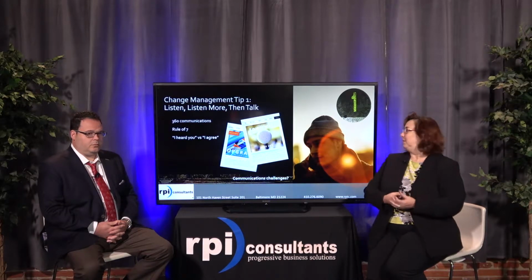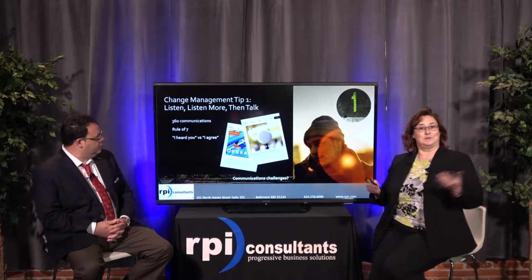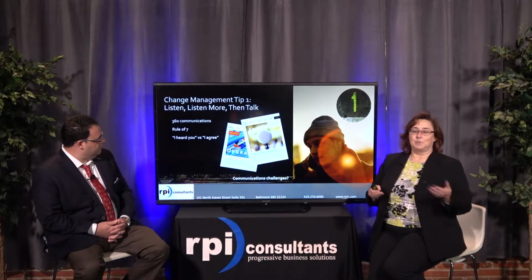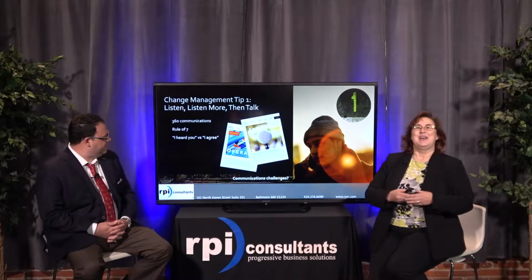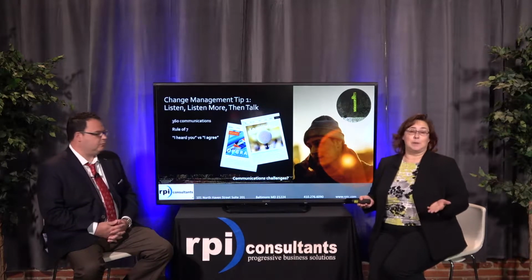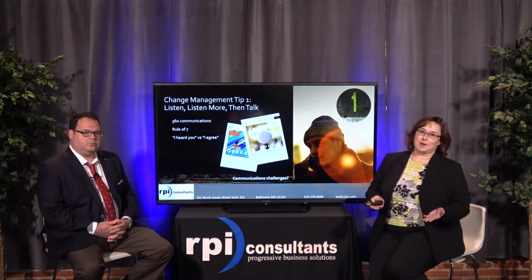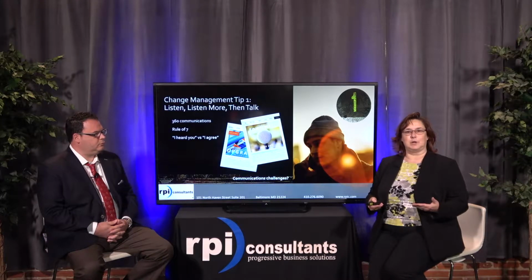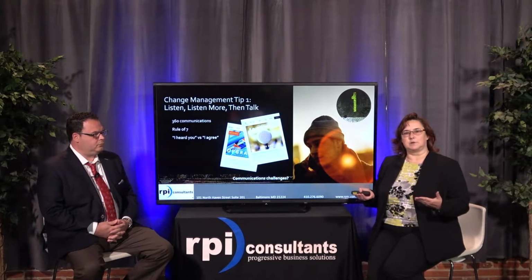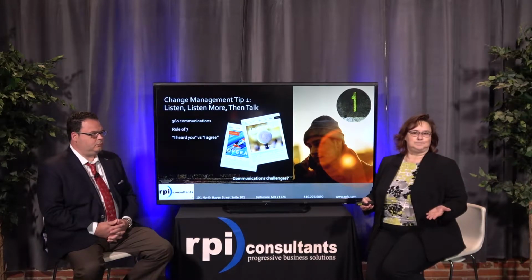If you look there in the middle of the screen, we've got an example of one of the forms of communication we're using right now with the Maryland National Capital Parks and Planning Group. What we did is we developed these collaborative e-newsletters that go out monthly to all the people affected by the project. And we've gotten tremendous feedback on these, that it's really keeping everybody in the know and up to date. We do things like feature some of the team members that are affected and how some quick wins are going so that they can feel good along the way.